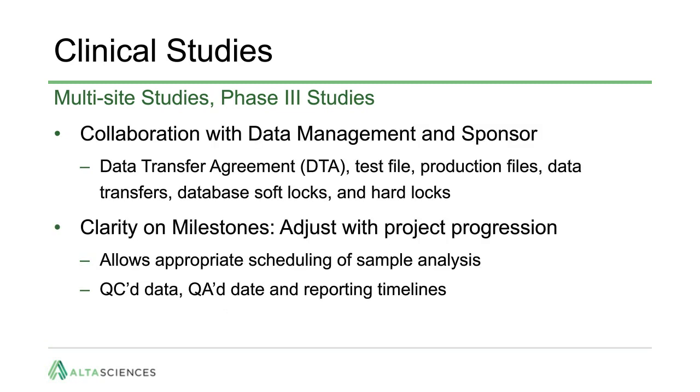The collaboration of the bioanalytical scientists is often with sponsor representatives and data management teams, and even other stakeholders. Schedules need to be managed for test files, production files, data transfers, soft locks, and hard locks of the database. Clarity on planned milestones allows for efficient project progression. In addition to the sample analysis, efforts should be made to set tentative schedules for QC data, QA data, and reporting timelines, and even reporting formats.